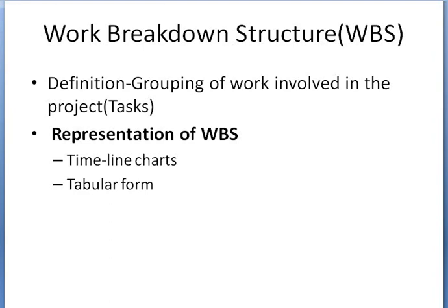After the work breakdown structure, there are two kinds of outputs: first, the scope baseline, and second, updated project documents. Scope baseline contains approved project scope statements, and project documents contain different documentation aspects regarding that project.